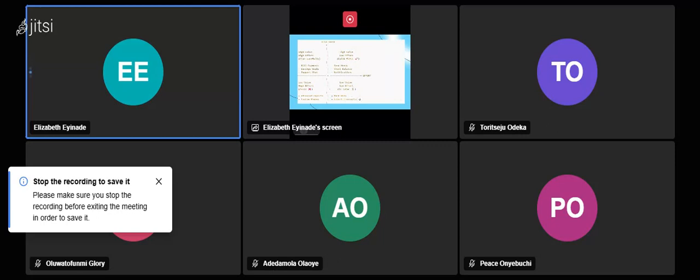But this one is low value and low effort. You do this later. These ones can serve as fill-ins. That is, maybe there is a blocker for the main one, which is the high value, low effort. When there is a blocker, you can fill in with these. Your developers can work on this because it's low effort, and the value is also low.